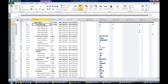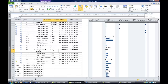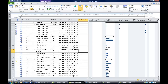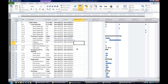Point 10 is to link all tasks — each task follows from the one before it, except for Finalize Move Date which follows on from signing the lease. You don't need to worry about the team meetings. Your very first task, speaking to agents about the new premises, doesn't follow anything so that's left blank. The view premises task follows on from the task above it in row 9, and you work down through the project entering predecessors as you go.